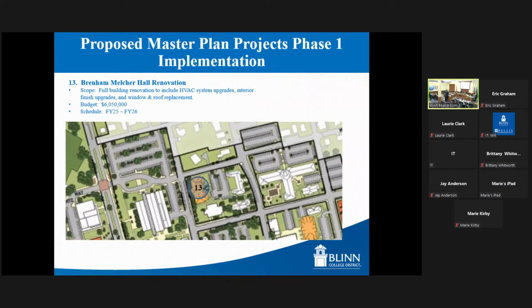This building was built in 1993. It's an 80-bed female building, and it's 20,000 square feet. The cost of this renovation is anticipated to be just over $6 million. And we would look to perform this towards the end of this phase one cycle in the FY 25-26 timeframe.